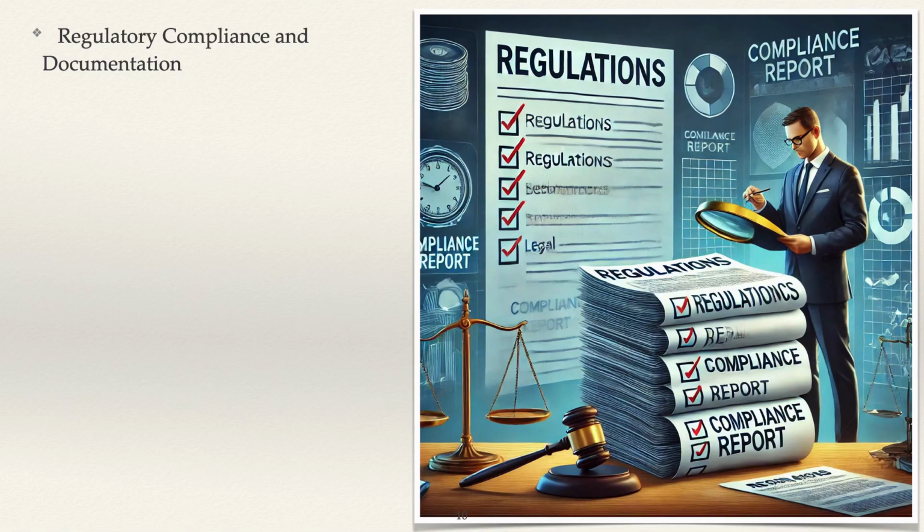F. Inspection reports and compliance audits. Regular inspections by regulatory agencies may be required to verify adherence to environmental, health, and safety standards. The contractor should document inspection results, corrective actions, and follow-up reports. G. Progress and compliance reporting. Submit regular reports to the client and regulatory agencies to update them on project progress, environmental compliance, and ROW maintenance activities. These reports demonstrate the contractor's commitment to regulatory standards and transparent communication.